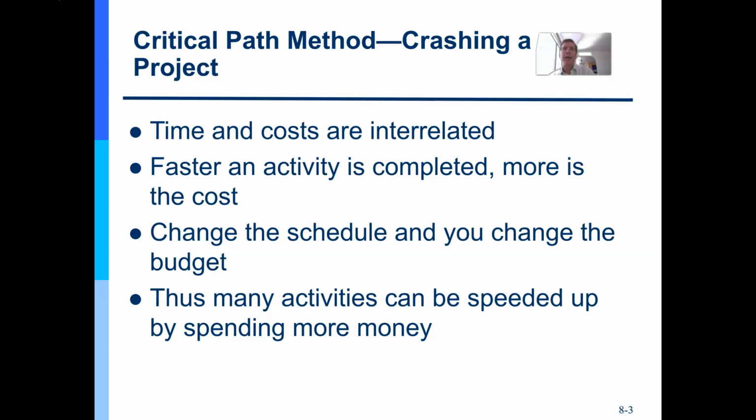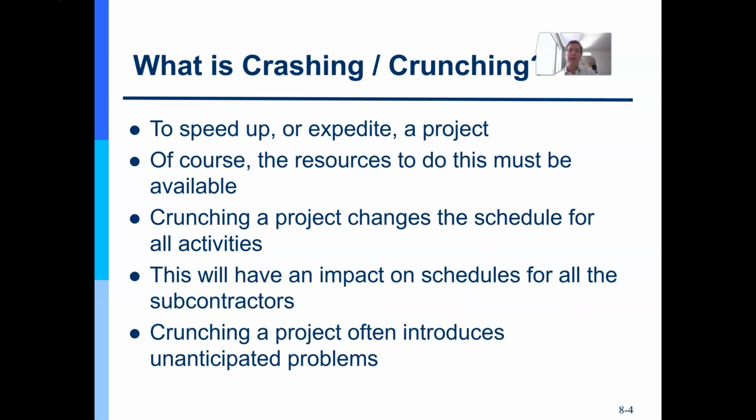But to add resources, even one, will accelerate the schedule, which helps the schedule management, but it will cost money, right? I mentioned as project managers, we're making trade-offs all the time between schedule, cost, and scope baselines. And so this is a way to change or accelerate our schedule.